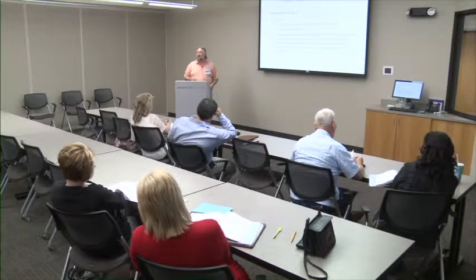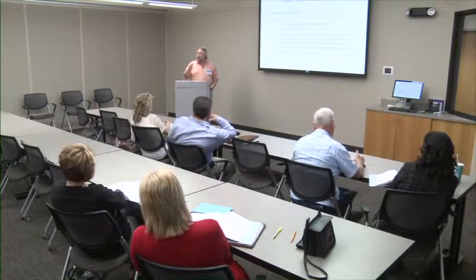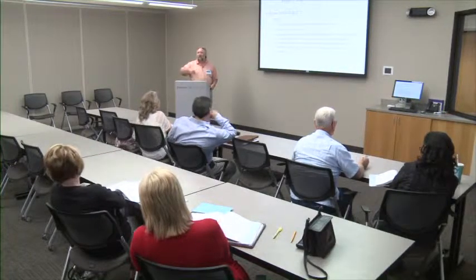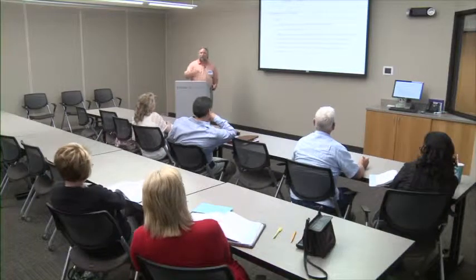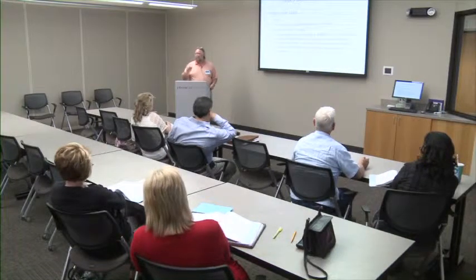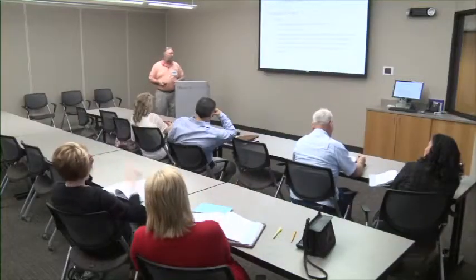Okay? So it doesn't take into consideration the fact that, yes, I know that it's going to take 12 hours to do that, but I can do it in 10, but the system won't let you change. It won't let you work in days for one thing and hours for another. So I can't look at the project portion of it that says these are things that are scheduled that it's only going to take 2 hours to do this, but I have to put it into the schedule as a day, so it's telling me that there's a day's worth of work there that's not there. I know it's different, but the computer won't let you tell it different things. You have to work in the right time scale.